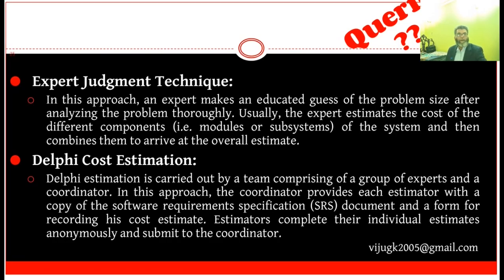The second method is Delphi cost estimation. Delphi estimation is carried out by a team comprising a group of experts and a coordinator. The coordinator provides each estimator with a copy of the software requirement specifications document and a form for recording their cost estimate. Estimators complete their individual estimates anonymously and submit them to the coordinator. The project specifications are allotted to the experts and they convey their views or opinions about the same.